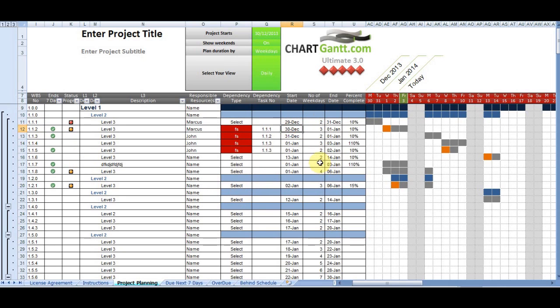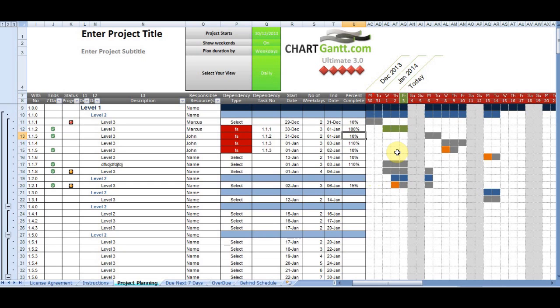We have a start date for the task, a number of weekdays and an end date for that task. We have a percentage complete. So if it's 100% complete, we'll see the red light's gone from that. That task's now being completed and it's green. So we can see within the framework of that.